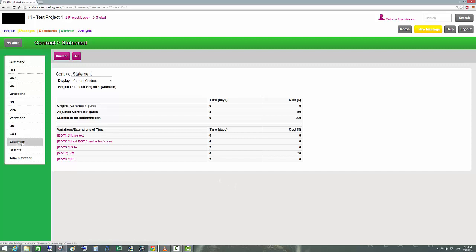The Statement section shows a summary of all time and cost that has been submitted for determination or adjusted contract figures. For example, the contractor submitted $100 for determination and the project manager approved $50 — similarly for time extensions. You can always go back and see what particular variation or extension of time was requested.